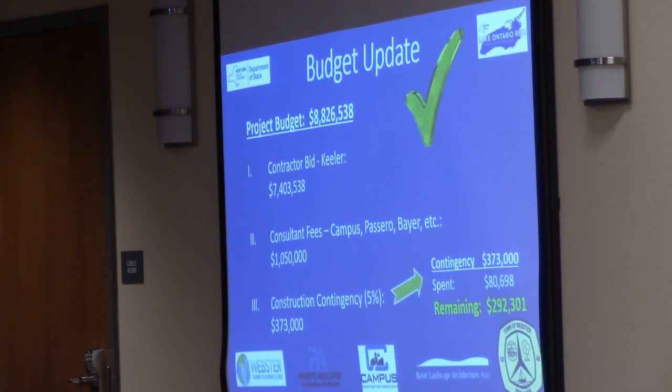At the initial onset of the project, most of your unforeseens with a project like this, things that are underground, things that you can't account for necessarily before you bid a project, these are the things that usually eat up a lot of that contingency cost. We're through that now. We're above grade. So it's a really good sign to be in the position we are. So budget-wise, the project is currently under budget, and I'm cautiously optimistic about moving into the 2023 year, being in that same spot at the end of the project.